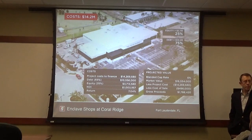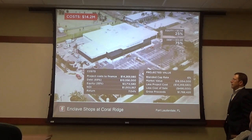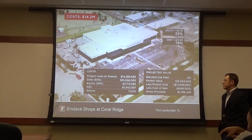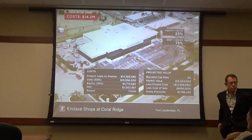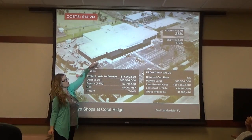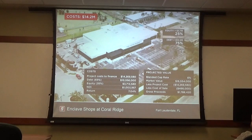Do you guys have major change orders in the construction, or minor? We had some change orders, but I'm glad we didn't have anything too major. I have had other projects that had some real surprises during construction. This one, we had change orders, but they weren't major. What was complicated during the construction of these projects? This one, it was a lot of the coordination with the tenant, working over the tenant. Also, the same thing with the government approvals. We submitted a simple permit revision for this restaurant that took us 4 months to get approved, so that put us behind schedule on the retail projects. Because of that, I ended up paying some extended general conditions on the project, which was a big change order.